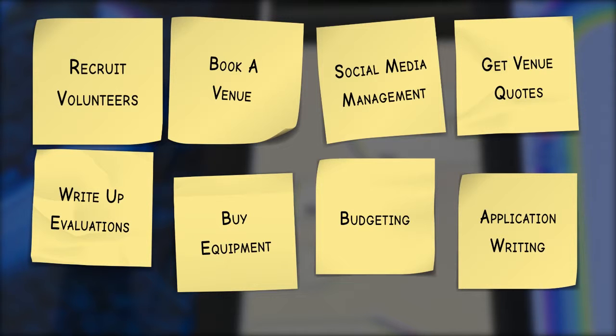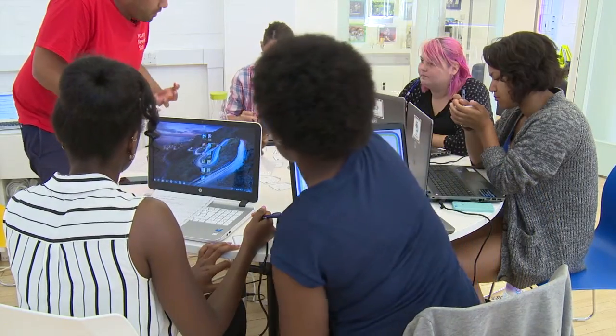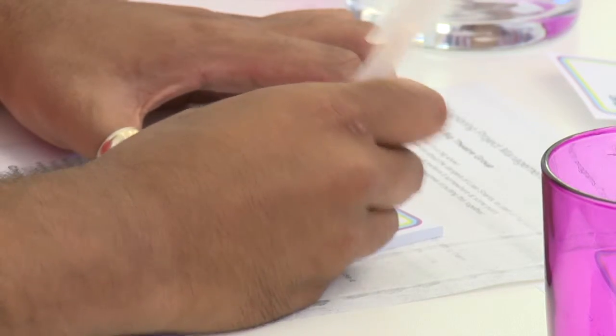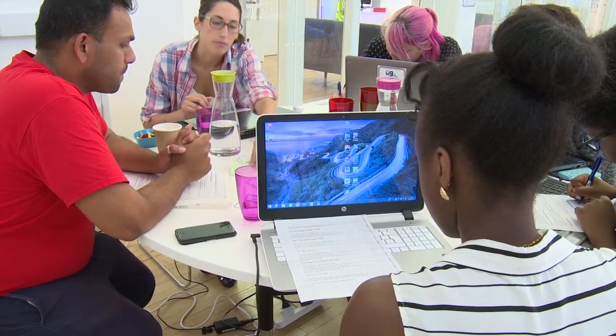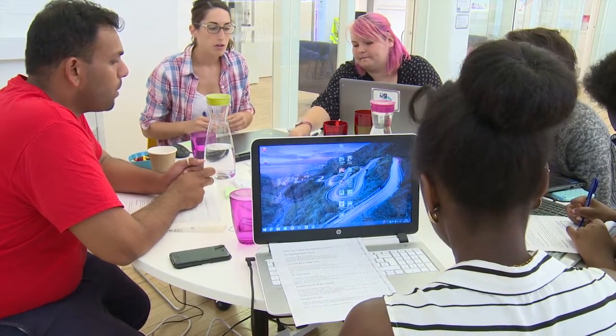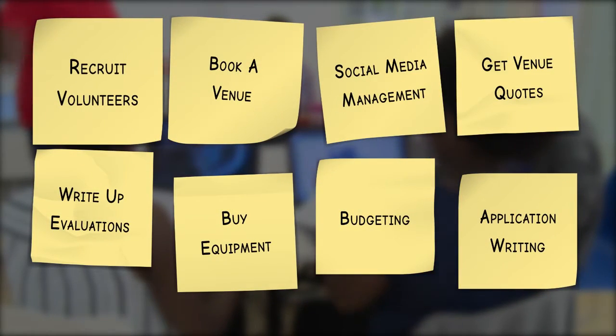Ask yourself questions like, what things need to be done on the day as part of your project delivery? If you've got a social media plan, what's going to be in it? Are there particular campaigns you're going to do? What are they? What specific tasks will they involve? If you've got tasks like have an opening celebration, think about all the little jobs you need to do to get to that point. For example, if you've got things like resource making, some events and some workshops, then you need to think about buying your resources, booking event venues, and what planning a workshop entails. Hopefully you've got a bit of an overview of some of the stuff that you're going to need to do. Don't be worried if it looks like a lot. The whole point of this video is to help you break down your tasks and manage them effectively.